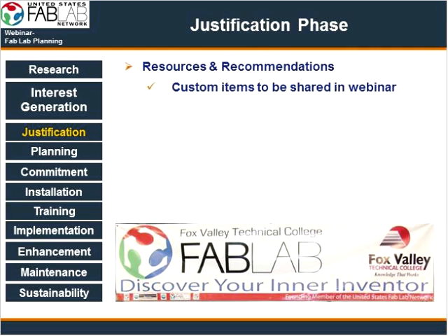We haven't talked time frames in the life cycle. Typically the research and interest generation phase can be 6 months to a year. The next phase is justification, planning, and commitment, which varies by organization. If you can pull all this off within a year, I think that's somewhat accelerated. But suffice to say, USFLN has a variety of resources to help your justification efforts.